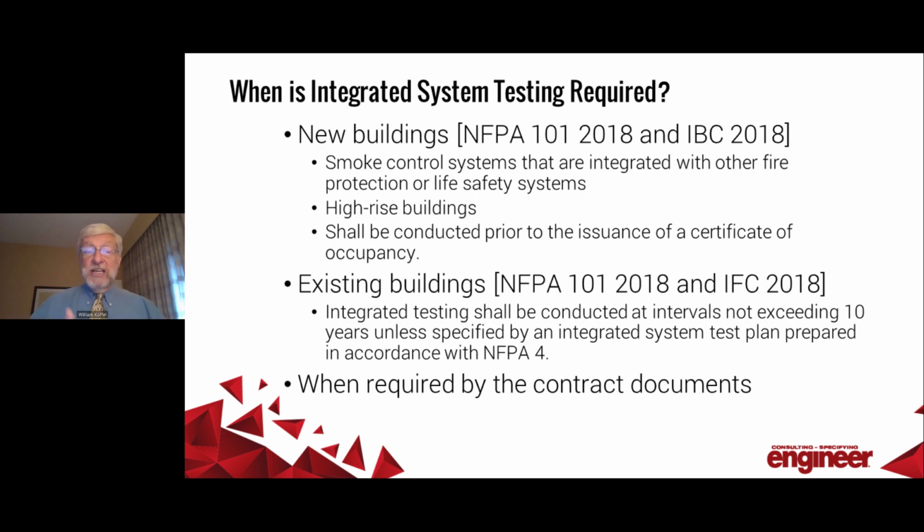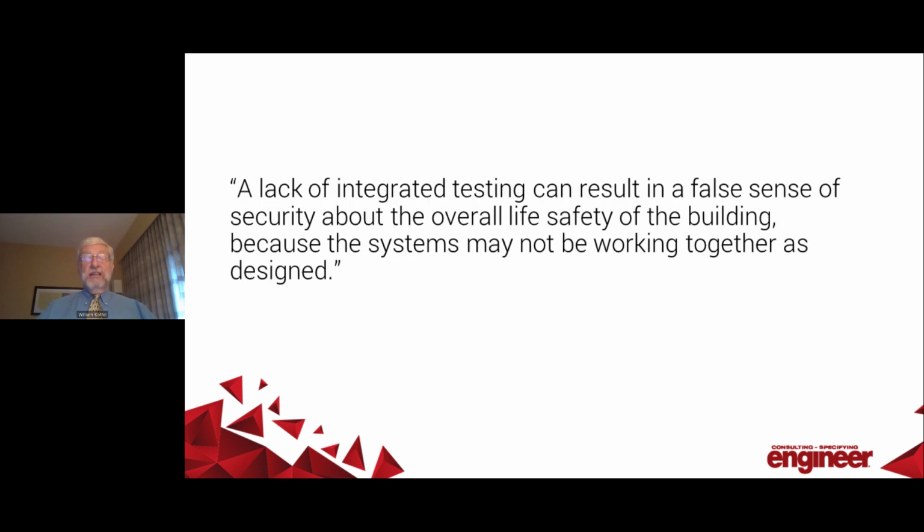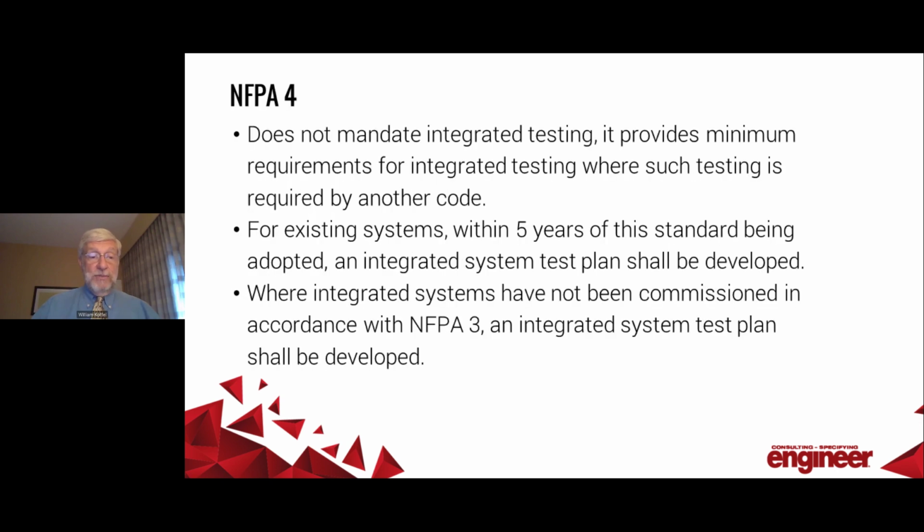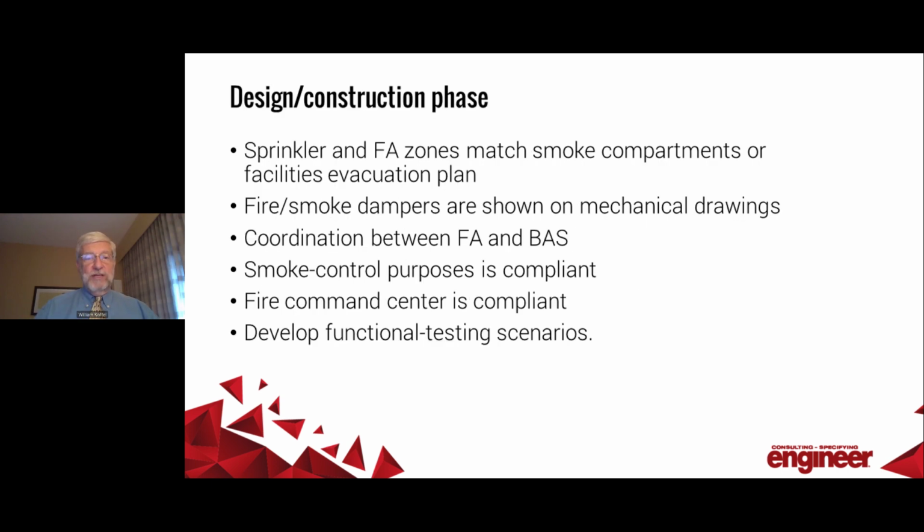I encourage design professionals to think about incorporating commissioning and integrated system testing in their contract documents, even if it's not required by the applicable code. Again, I mentioned that NFPA 4 has a 5-year period. The codes have generally extended that out to a 10-year period, but they both reference an integrated system test plan that was developed typically by the design professional for that system.